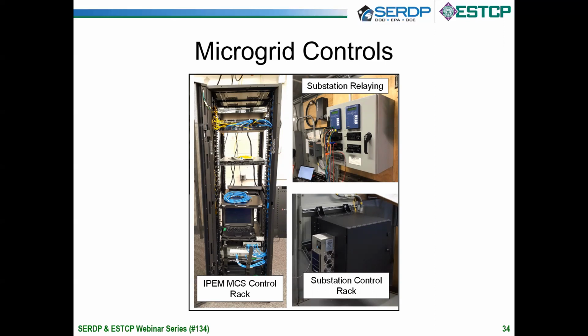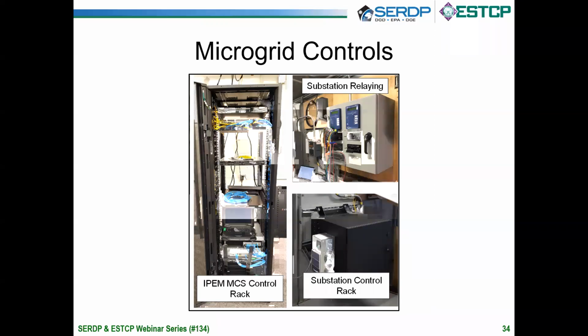And the microgrid network was built on existing dark fiber they already had, so we didn't have to ride on any of the existing networks that they had at the base, which was actually a big help in terms of having an installation that was easier to get through cybersecurity approvals, due to the no possibility of data intermingling between our microgrid network and any of the other military networks that would be running on other fiber elsewhere in the base.